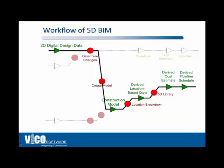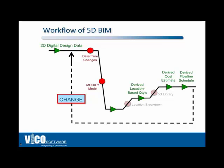What's exciting to me — and I watched this happen in the manufacturing industry 20 years ago — is that when something changes, you go back to the beginning of this loop and replay it, but you don't have to redefine the location structure. Those location structures are persistent in the Constructor and Constructor Office databases. You don't have to redefine the 5D library either — it's ready to be used on this project or the next one. So based on those changes, you modify your model and replay quantities, derived costs, and derived schedule. That's why you can turn this around so quickly.